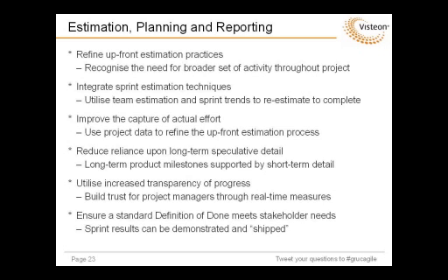We were also very keen to make sure that we started capturing real actual effort and make sure that got fed back into the estimation process. You get those classics in an organization where everybody just tracks 7.5-hour days no matter what they actually do, and we need to get much smarter about capturing real effort so we can have a better understanding of what we're really doing.